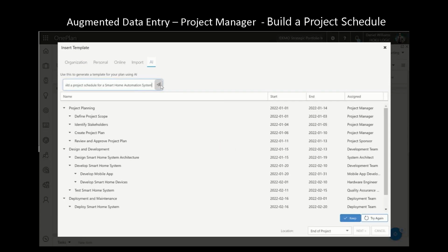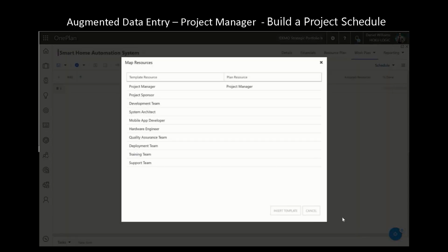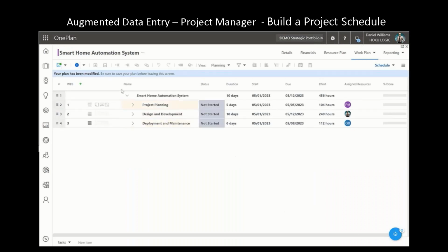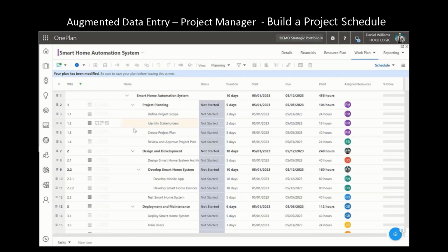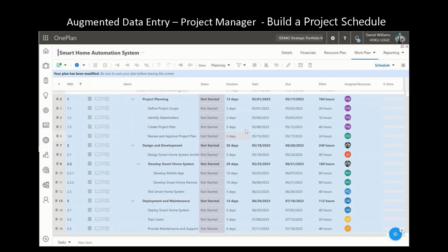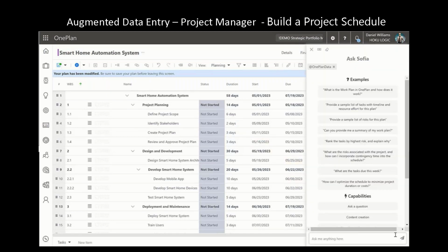We've never done it before. So what's a reasonable template that we can use? And here, again, SophiaGPT is going through, defining the work breakdown structure, defining the resource types, which I could be mapping, by the way. You saw that I actually mapped it. And then it's going through and actually giving me the WBS. Now, from here, I can then make changes to it, insert dependencies, change any of the specific durations that I might want to in order to formalize my plan.